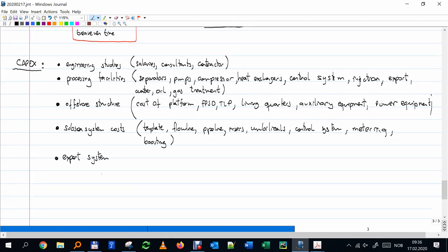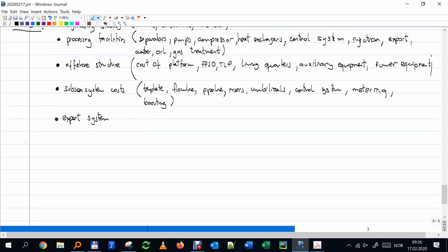Okay, let's go very quickly through the others. DrillEx. For DrillEx, we have the drilling rate of the vessel that we are using. Sometimes they charge some amount per day, so how much it will cost. Then I have the drilling materials.